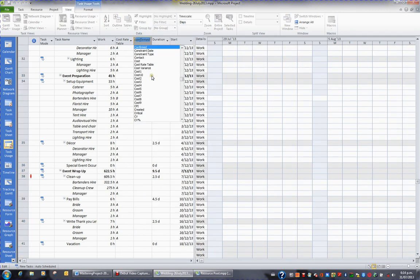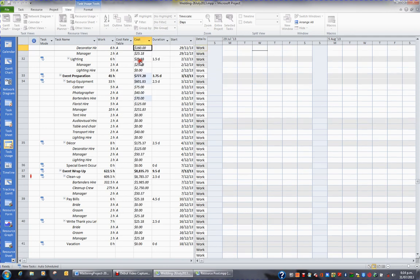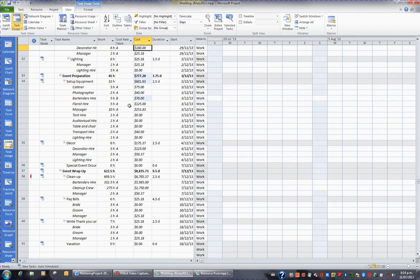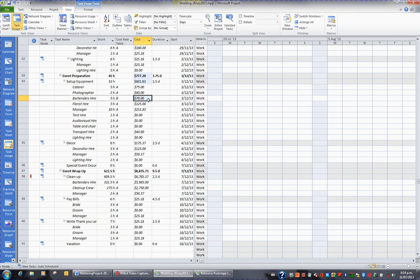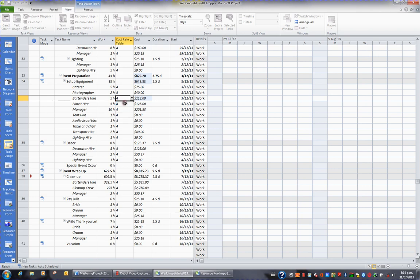So I hit C. I then click on Cost, and I can see the cost of the bartenders working on this particular task for 5 hours is $70 at their B rate. If I change that back to their A rate, I can see it's $118.